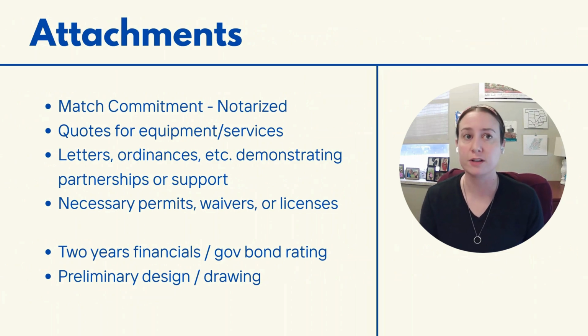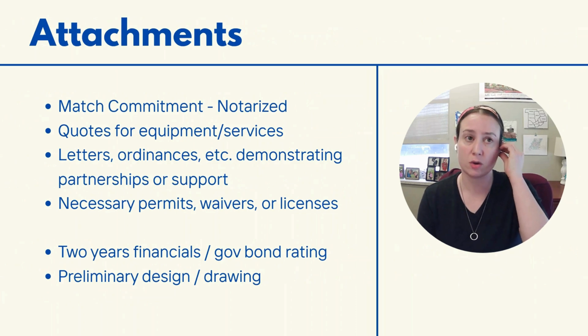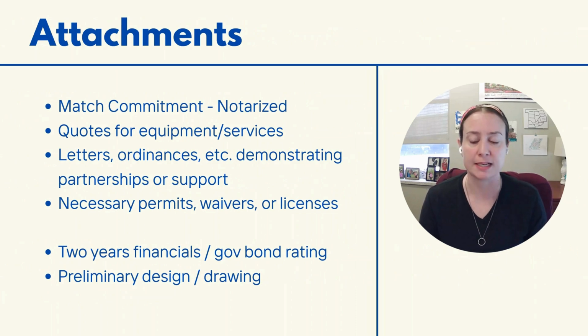And whatever the project costs, unless there's an amendment at some point, you are committing to put in that amount of money, whether it is with volunteer hours, labor hours, in-kind activities, or just cash paying for other project components. That amount is a hard amount. So we ask for a match commitment document, which is notarized.